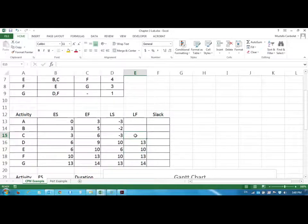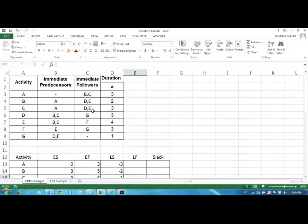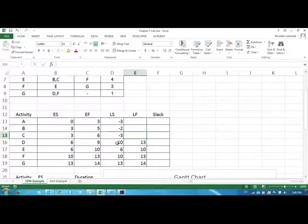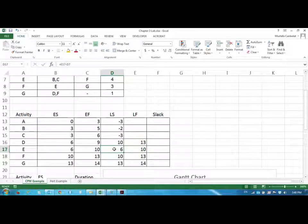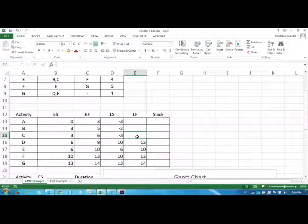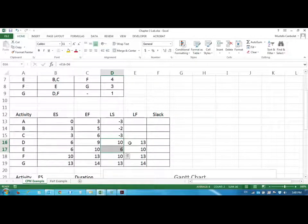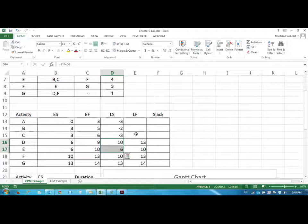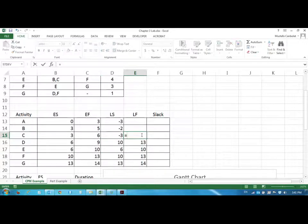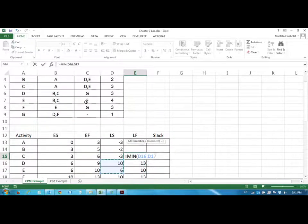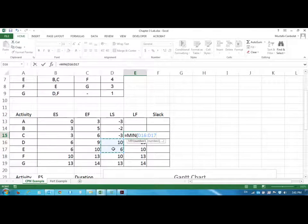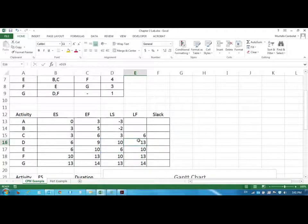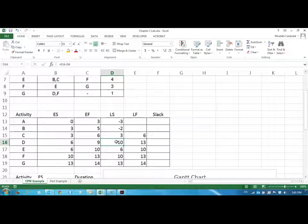And C has two followers D and E. Now D can start as late as the 10. But E has to start as late as 6. When should we finish C the latest so we will not delay any one of these. In that case opposite to the early start early finish idea we have to take the minimum of the two, minimum of the immediate followers late start times because we do not want to delay any one of these activities.